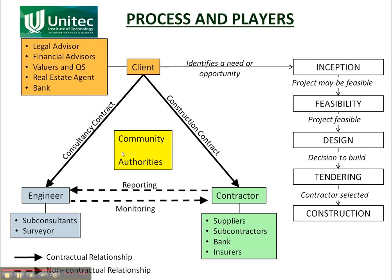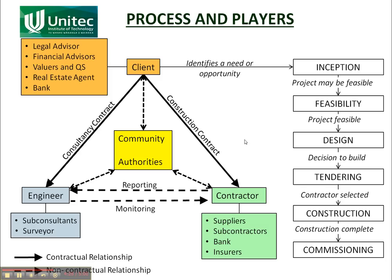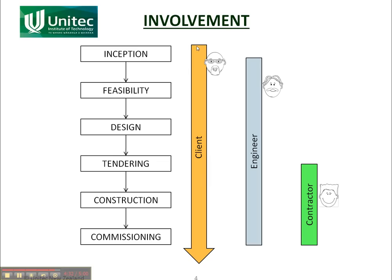There's also the community — the people in the area — and the local authorities and consenting authorities, and all three parties are involved in communicating with them. When the construction is complete, the works are commissioned and handed over to the client. The client is involved right from the start; at commissioning he takes over control of the project works and is involved further on. The engineer's responsibilities start at inception and end when the project works is commissioned. Same with the contractor — at the end of commissioning, the contractor is finished. The next few slides look at each of these parties in more detail.